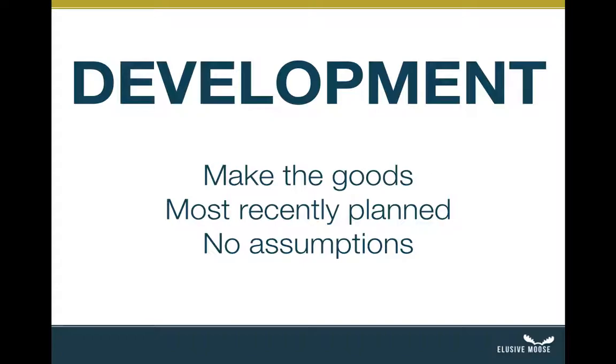Is there a verification step you like to do? We agree this is what we want to do, I made you a prototype, you stop and ask them, is this what you had in mind, or sign off? That's the review. Really, it's the review of the iteration. I think they're tight enough. Typically, a 2-week iteration. Some of my clients, I'm actually doing weekly iterations. So with that, in a weekly iteration, I'm developing 15 hours of work.